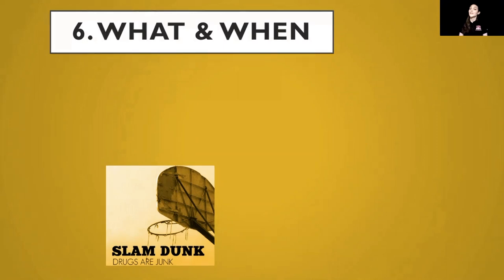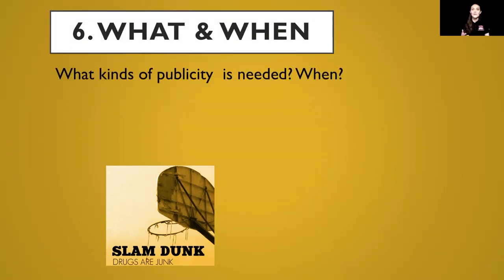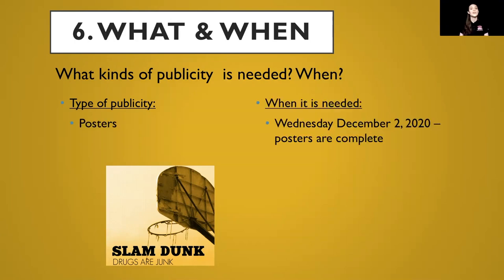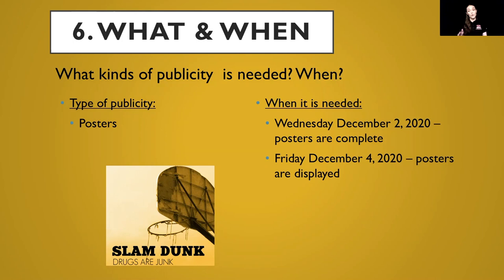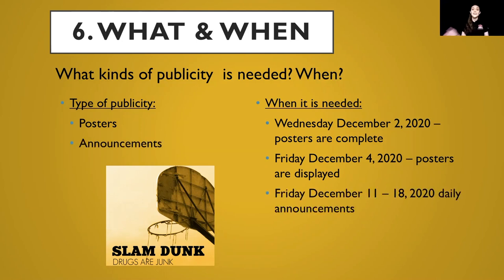Our sixth W focuses on 'what and when' — what kind of publicity is needed and when. For type of publicity, I'm thinking posters. When are they needed? Wednesday, December 2nd — about two weeks prior to our assembly date. We want to make sure the posters are completed, and by Friday December 4th we want to put them up around campus to start advertising. Another type of publicity is announcements — the week prior to our assembly, we can start daily announcements to bring awareness and let the whole campus get excited in anticipation for the assembly.